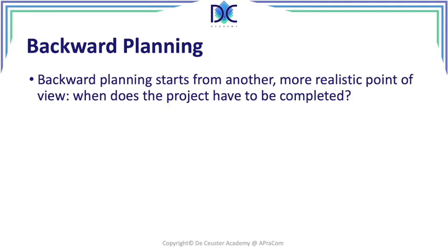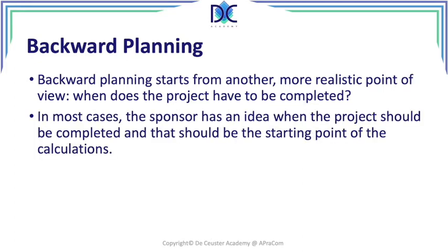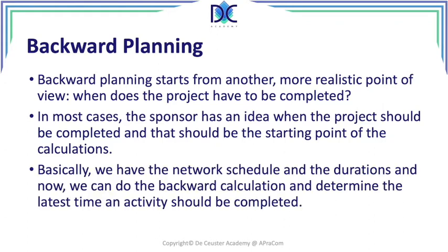Backward planning, we look at the planning and we calculate back and we start from the idea, when does the project have to be completed? Typically, the sponsor has an idea when the project should be completed, and that should be the starting point of the calculation.